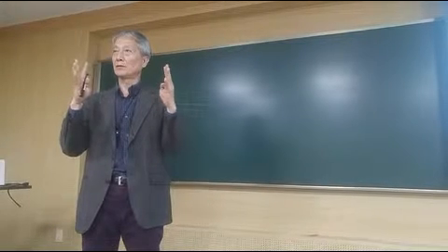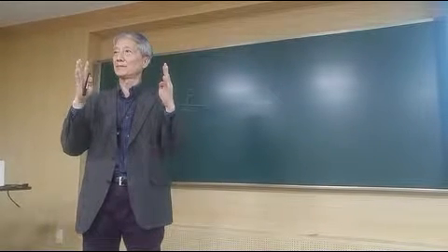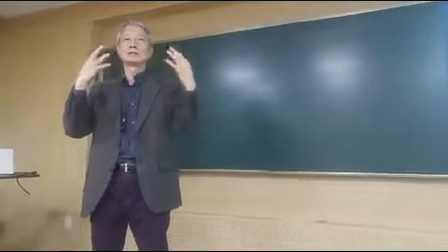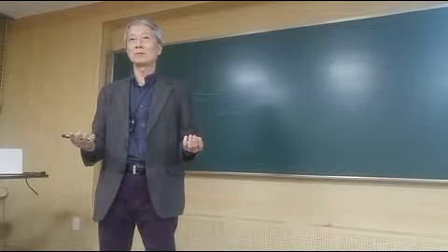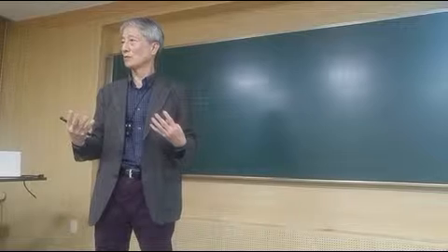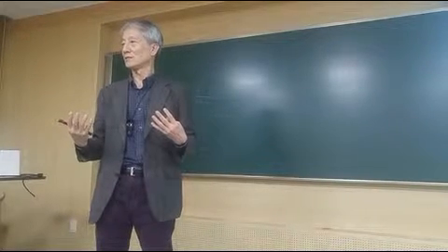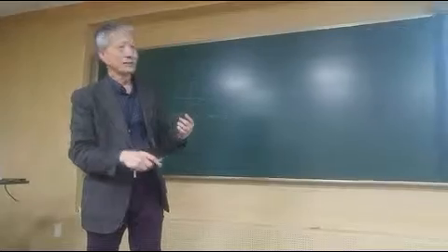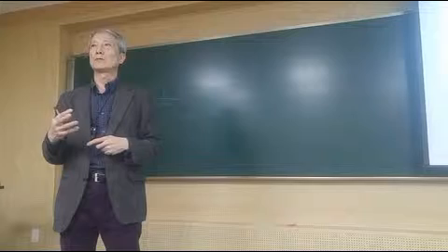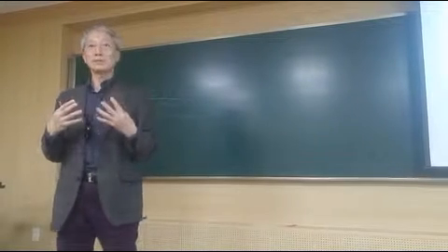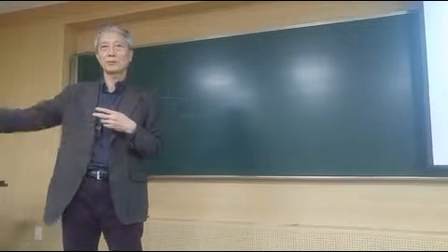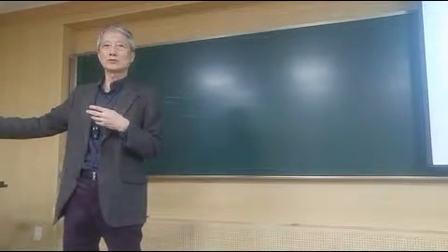But what happens? The problem of reducing time: what can happen if I start my work before the design is finished? What can I purchase? What can I construct without drawings? Anyway, they want to do parallel processes. So the problem is, if I change my mind as a component designer, then the purchase should be cancelled and the other one should be purchased.